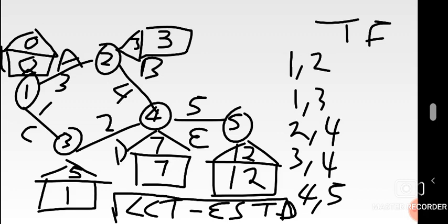So the latest completion time of the ending node between the two that are connected to each other, if it's 1 and 2, 2 is the ending node, minus earliest start time, meaning 1 will be the starting node in that case, and then minus duration, that arc there, that's what the figure is. So in the first case the total float is 0. Second case, from 1 to 3, the latest completion time is 5, minus earliest start time 0, minus duration 1, giving you a total float of 4. And the sequence continues just like that.